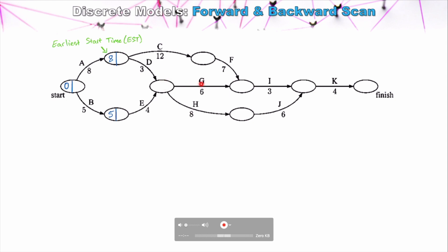When we look at the node where Tasks G and H require both Tasks D and E to be completed, we have to consider both options. Through Task E, we could start G and H as early as nine units of time. However, we can't start G and H until Task D is also complete, and Task D can't be completed until 11 units of time. So the earliest possible start time we enter here is 11 units, despite Task E being completed as early as nine. This means we can delay Tasks B and E by two units — referred to as slack time.